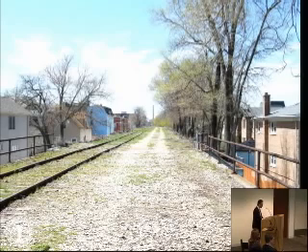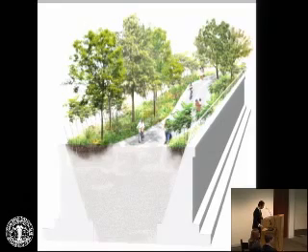In addition to the park and multi-use trail, the project includes rehab of 38 viaduct structures, replacement of 2 viaduct structures, repairs to 37 embankment segments, construction of up to 13 ADA accessible access points, and design of 2 new parks, Park 512 and Kimball Avenue Park.